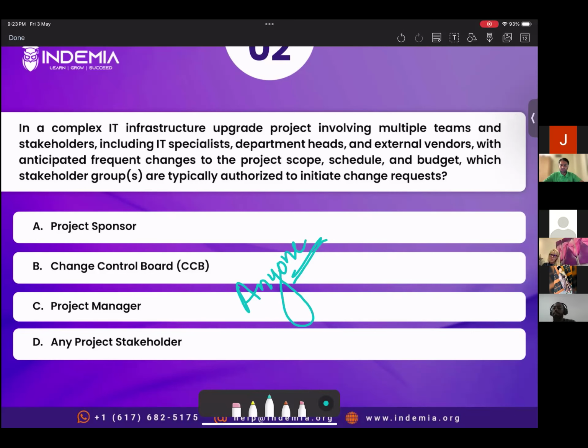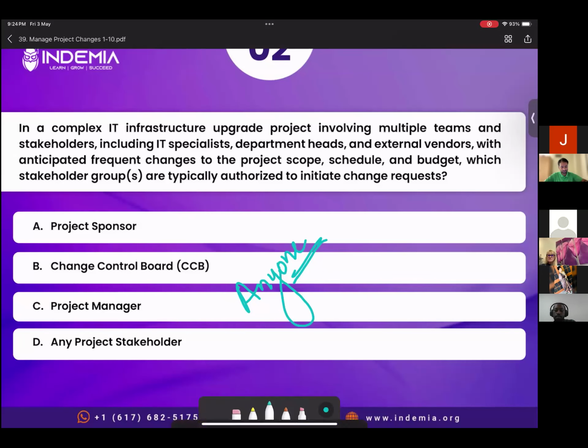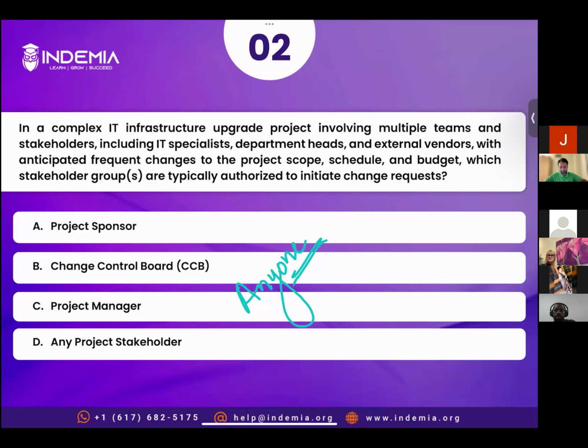Then it's the project manager's discretion, and the CCB's and sponsor's, to decide whether they want to approve it or not. Any relevant project stakeholder can request a change, right? Due to their concern, if they are impacted by your project, they can request a change. They can say this particular aspect of the project should be changed because of environmental concerns, better quality, a missing requirement, or changing requirements. So any stakeholder can request a change, right? Let's read the explanation. The correct answer is option D.